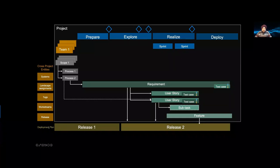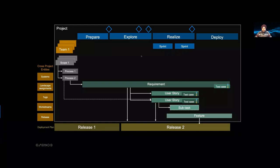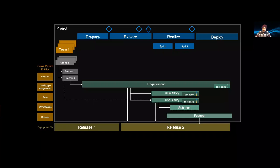Once you assign a deployment plan to the project, the project suddenly becomes aware of the landscape. Now in the project itself: timelines include phases with start and end dates, optional custom phases, optional sprints aligned to phases, and milestones aligned to phases. You can create one to many teams — for example, compliance, audit, security, and testing teams — each with a role list that can be deactivated to simplify or extended with custom roles.